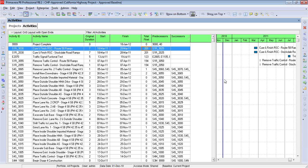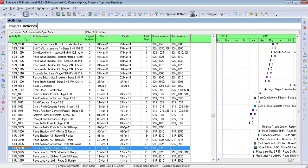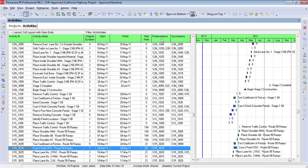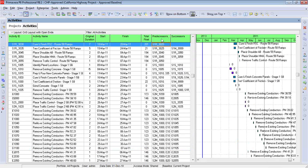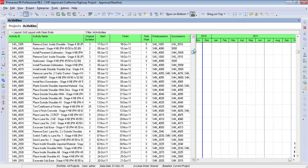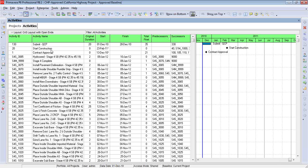If you've watched our other videos, you know that any column within the activity table can be quickly sorted by clicking on that column header, either in ascending or descending order. So what I'm going to do now is click on the columns that represent the logic. I'm going to click on the predecessor column. And I'll click again so that blank values go to the top of the screen. And so what we see here are three activities that are missing predecessors. Obviously, one of them would always have to be an open end. That would be, in this case, start construction. But the other two clearly are missing predecessors. So that's something I would need to fix.